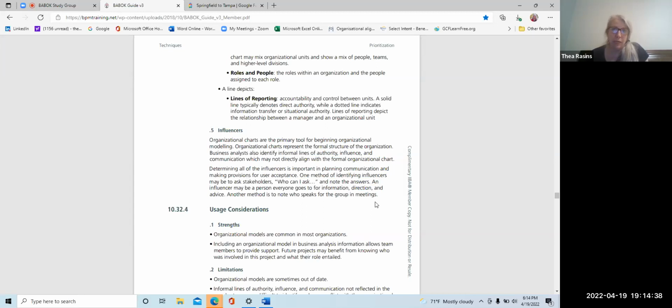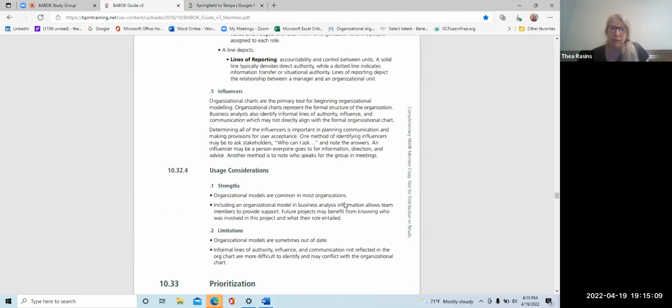Everybody knows they have all the answers, and they worry about what's going to happen when that influencer leaves the company because they take all of their tribal knowledge with them. You need to ask, whenever you're in meetings with your interviews as well as meetings in groups: Who can I ask? Who else should I talk to? Who knows about this? Who else would like to know about this? And you're going to find that the people that are influencers may not be, again, the people that have the fancy titles.